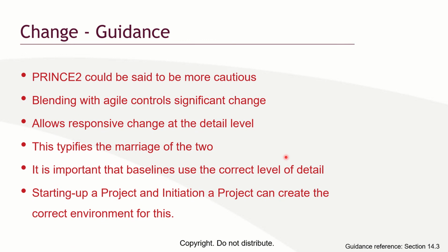For example, when someone is doing a project and the project is a three-story building, if that is what you are told at the beginning, and after you have laid the foundation, you are now told to make it a 10-story building, is that going to work, Mr. Lushola? It won't. Why? Because the baseline cannot sustain it. It's for three. It can't work.